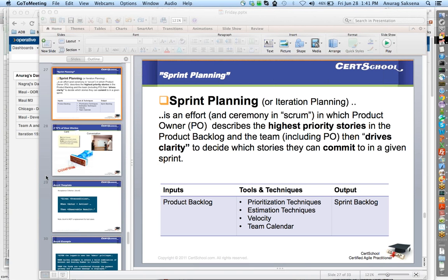What are the INVEST principle and epics? Okay, so the INVEST principle is something that I discussed in the previous webinars. The INVEST principle is one of the guidelines. I stands for independent, N stands for negotiable, V stands for valuable, E stands for estimatable, S for small, and T for testable. Okay, so this is a guideline given to you when you're writing user stories.